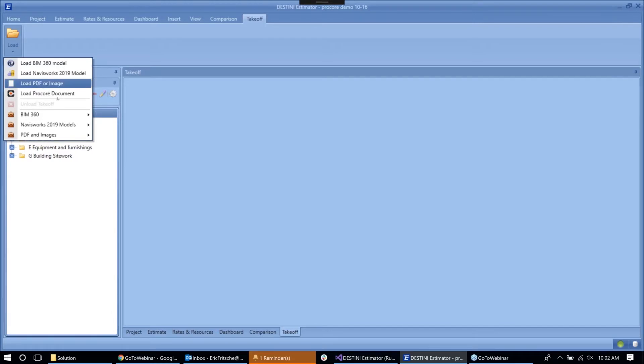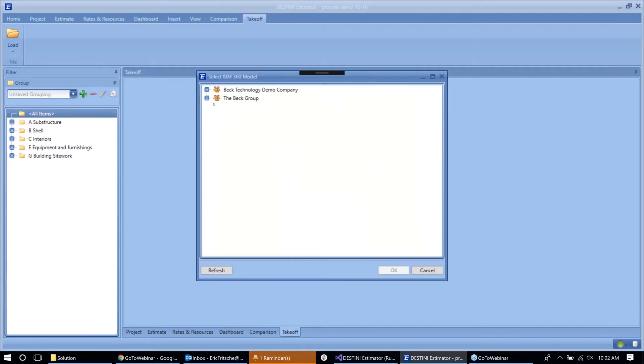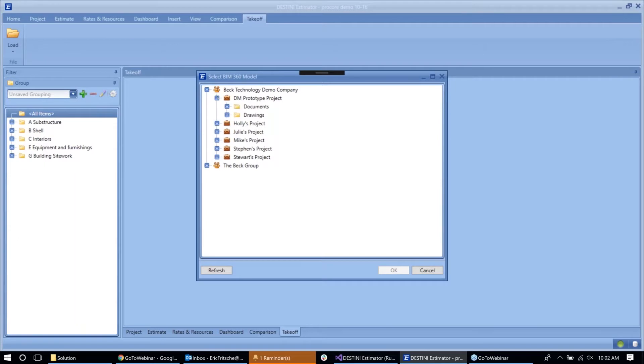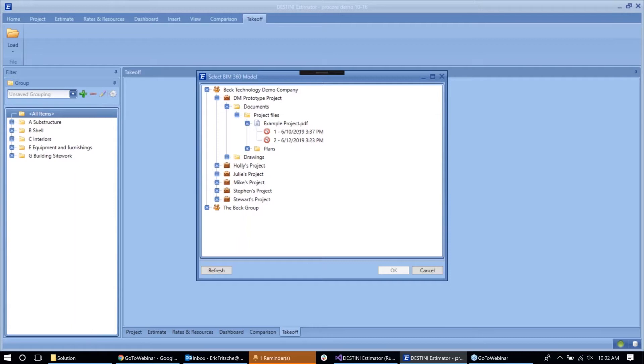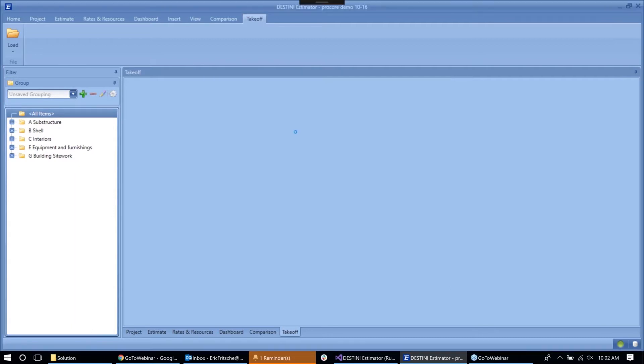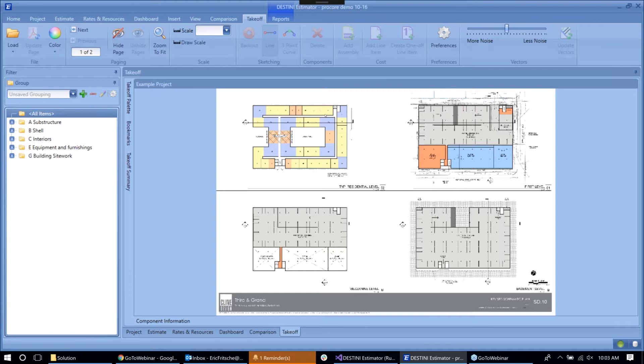So what I have set up is a simple project that just has a couple of drawings loaded up to it. And so here in Estimator we now have the option to load a Procore document. And what this is doing is communicating with Procore and pulling up all of the companies that you're a part of and all of the projects that you have access to. So I can go here and just as if I was navigating something on my computer, I can go all the way down to the project PDF, see all of the versions that have been loaded, and just very easily pull that from Procore directly into Estimator where I can then start doing my takeoff, just as if I had access to this document natively on my machine.